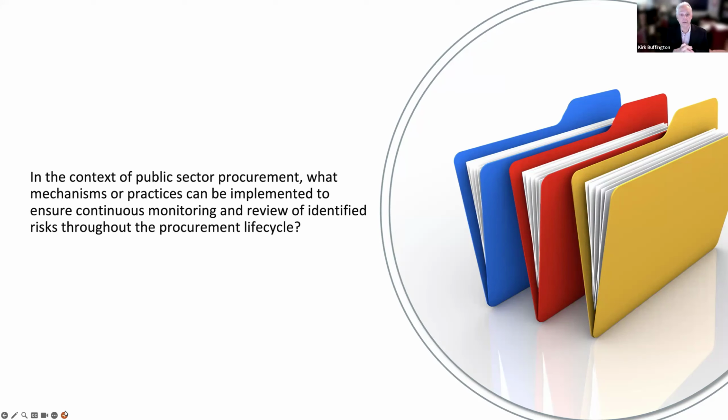Most of you got that right. A surety bond is not the same as insurance. Insurance pays you a lump sum payment, whatever it is, $100,000, $500,000. That's your payment. You still have the responsibility to take that funding and complete the project. Whereas with a bond, the surety is obligated to finish that project for you at the same contract cost that was awarded and complete the project. So well done.